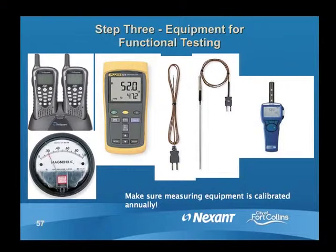If we get into functional testing, what functional testing means is, when I talked about doing calibration checks, checking if a temperature sensor is calibrated, or if a damper is working, or a valve is actuating correctly. Oftentimes, I need 2 people to do that. That's why I have a picture of the 2-way radios up there. I need one person sitting at the screen saying what it is, and the other person actually taking the measurement or doing the observation. So, we'll use a digital thermometer, maybe a CO2 meter if there are CO2 sensors, a Magnehelic if we're checking the pressure sensors to see if they're calibrated.